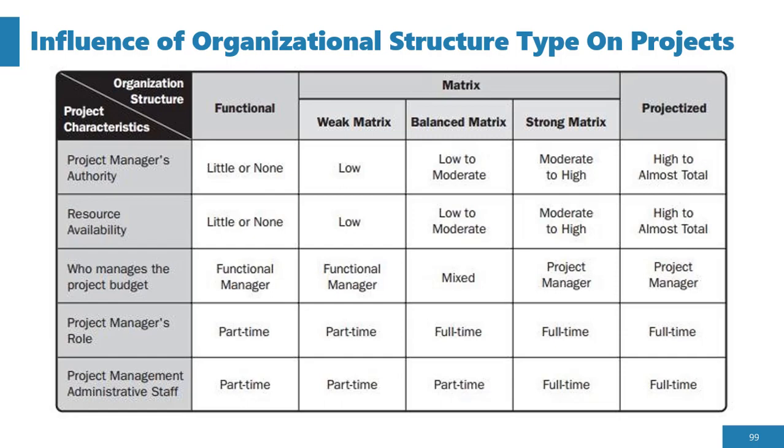So you are not a full-time staff of that bank. You're only there part-time for the purpose of that short-term project. Okay, in a weak matrix your role is also part-time. In a balanced matrix, yes, it could be full. In a strong matrix, full-time. And then in a projectized organization, it's also full-time.